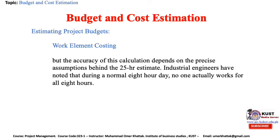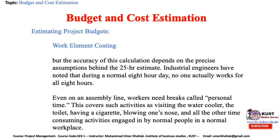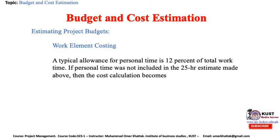However, the accuracy of this calculation depends on the precise assumptions behind the 25-hour estimate. Industrial engineers have noted that during a normal 8-hour day, no one actually works for all 8 hours — workers need personal time for breaks, visiting the water cooler, and other time-consuming activities. A typical allowance for personal time is 12% of total work time. If personal time was not included in the 25-hour estimate, the corrected cost calculation becomes: 1.12 × 25 hours × $17.50 × 1.84 = $901. Not including personal time ensures an underestimate.